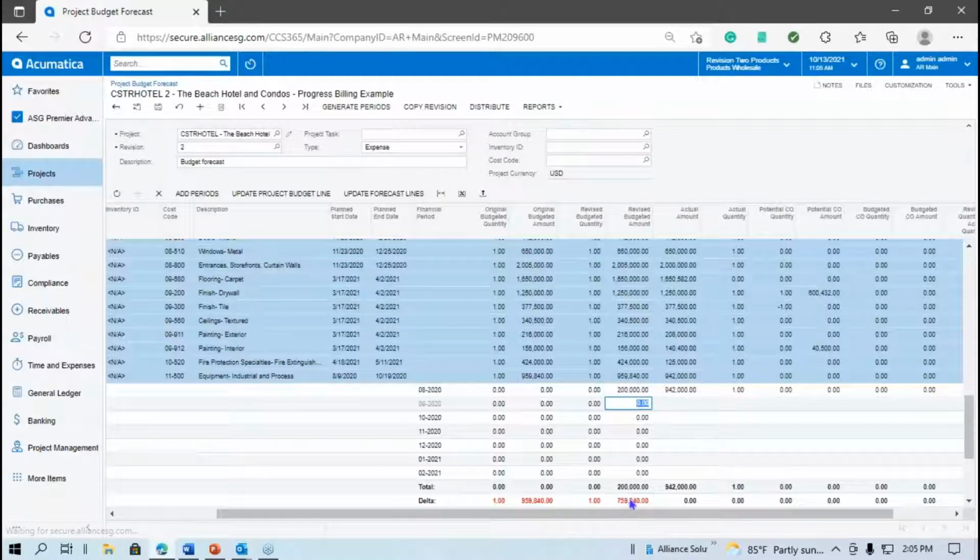And so forth down the line. And you can see I'm getting my delta. It's telling me whether I'm in the right place or the wrong place at any given time. So we can do this on every single line within our budget. So instead of having it for a single total amount of the job, I can actually start seeing what I think we're going to spend on these jobs every single month, allowing me to project what I think my cash flow is going to be from these jobs.